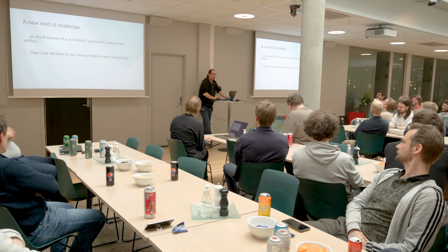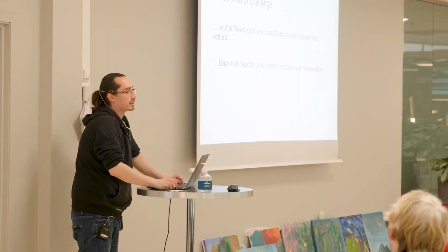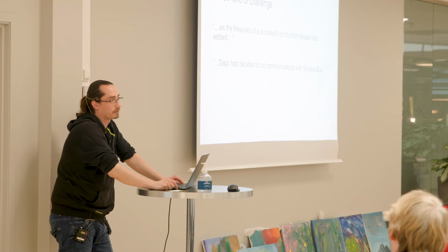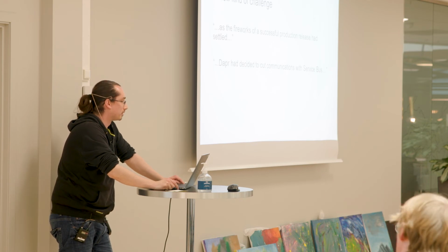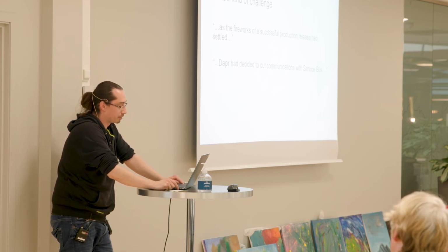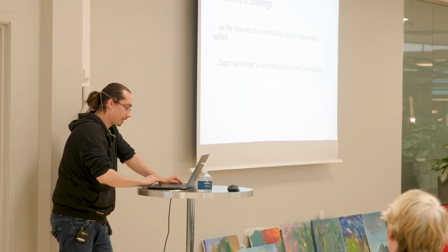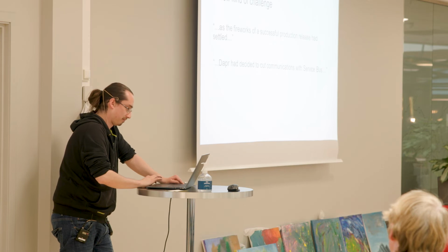Apart from that, one thing we did do right, though, is that we set aside a bunch of resources right after the production release, in case something like this happened. So we were at the ready, and we were able to handle it fairly quickly, at least in terms of mitigation. So it's not all bad.